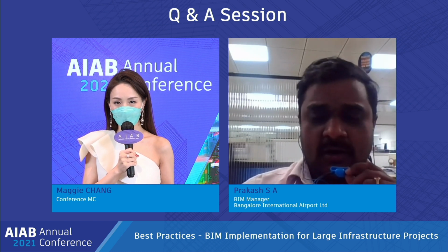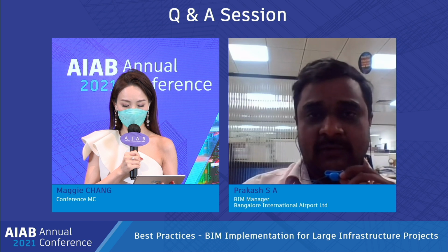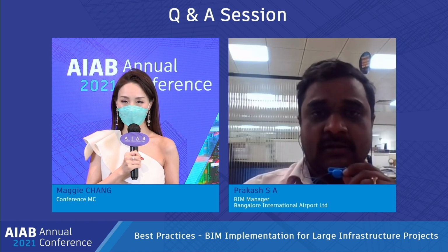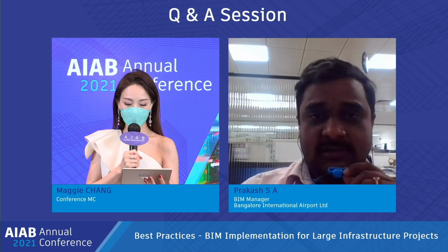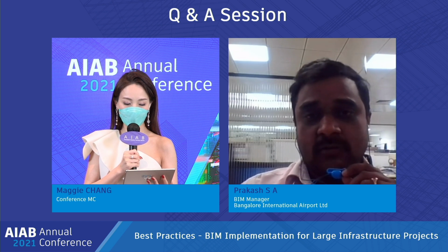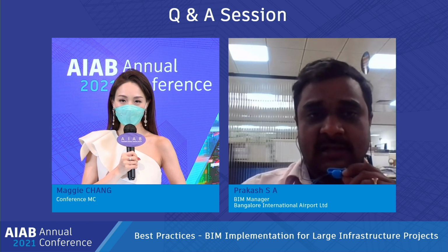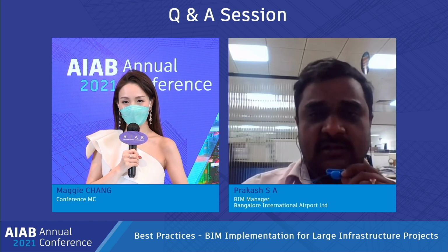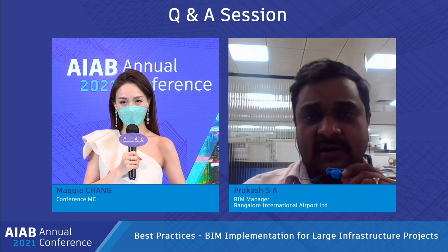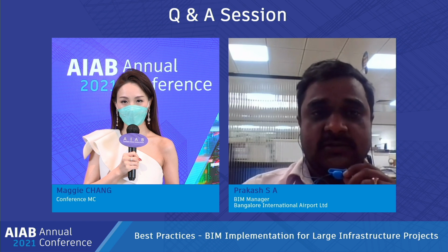Okay, so in our project, the RFI works directly from the EPC contractor. Whatever doubts they have or clarifications they need in the design or in the site execution part, they can send directly to a particular person or a particular department. Once they publish their RFI, it goes to that person or department, and once they answer, it comes back. It may be a person or the department head. It's an easy process. We standardized our process, and this process makes it very easy to solve all the issues from design to construction.